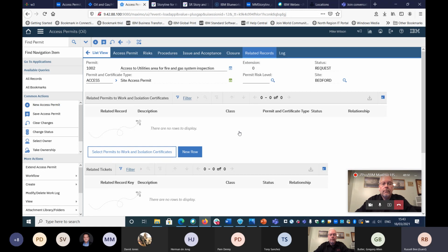If you have a lot of existing work orders and we're adding information onto the work orders, you need to think about the timing and the time to actually update and go through the various processes associated with the installation. So typically the profile of implementing these sorts of applications is to implement them incrementally.